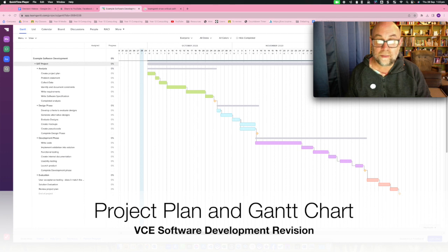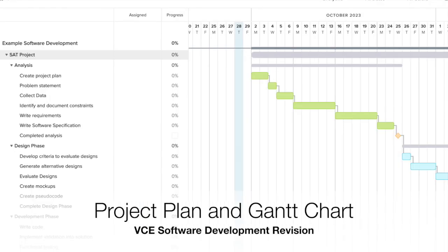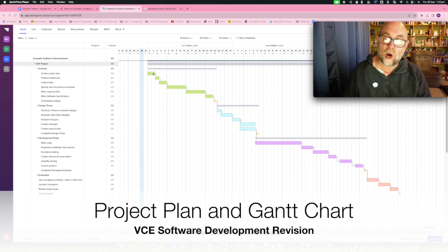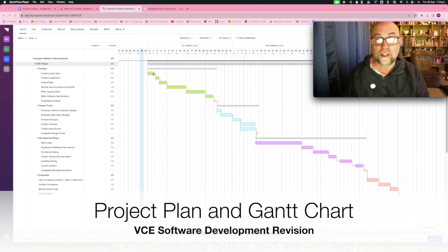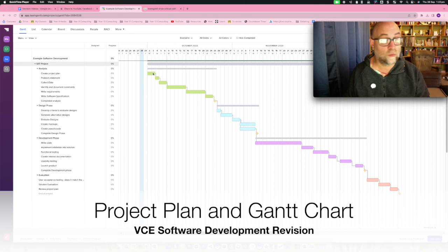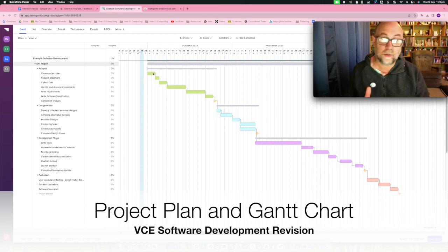Those lines in between them are dependencies. For instance, it says here that we can't create a problem statement until we have completed our project plan. In actual fact we might not have that dependency — that is a decision for the project manager to make. When you're working on your own you'll notice that pretty much everything is dependent because you are the only person working on this, but you don't have to have dependencies between some things.